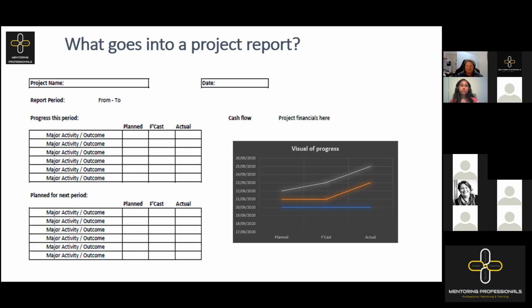So if you're working with agile teams and you want to report, then it means that you physically have to be there to get one, which is great if you happen to be in the same room as them. If not, the way to work with agile teams to enable you to do your accurate reporting is ask them to send you a snapshot, a photograph on the iPhone or Android phone. Ask them to send you a picture of their team board, because they do progress reporting every single day.